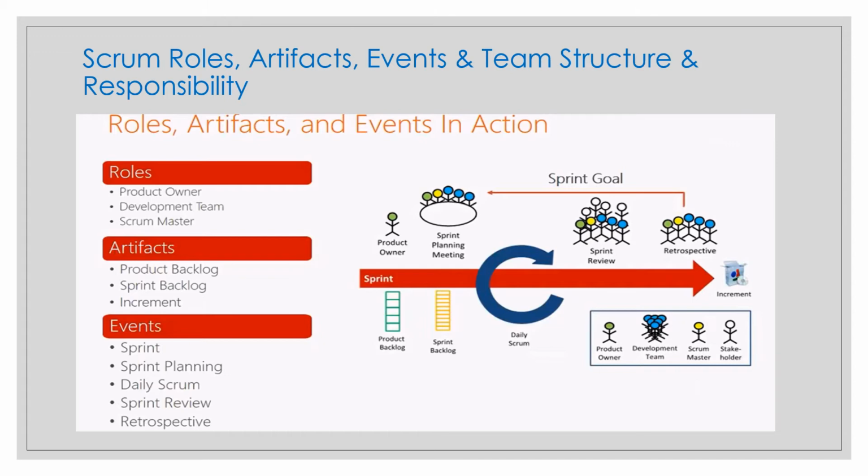So the daily scrum is a 15-minute event for the developers of the Scrum team, and to reduce complexity it is held at the same time and place, in fact all the events. As per Scrum Guide 2020, even the sprint retrospective happens at the same time and same place to reduce complexity. They can definitely do it in another place, but to stick to the Scrum Guide 2020, all the events should be in time boxes, same time and same place, of every working day of the sprint.